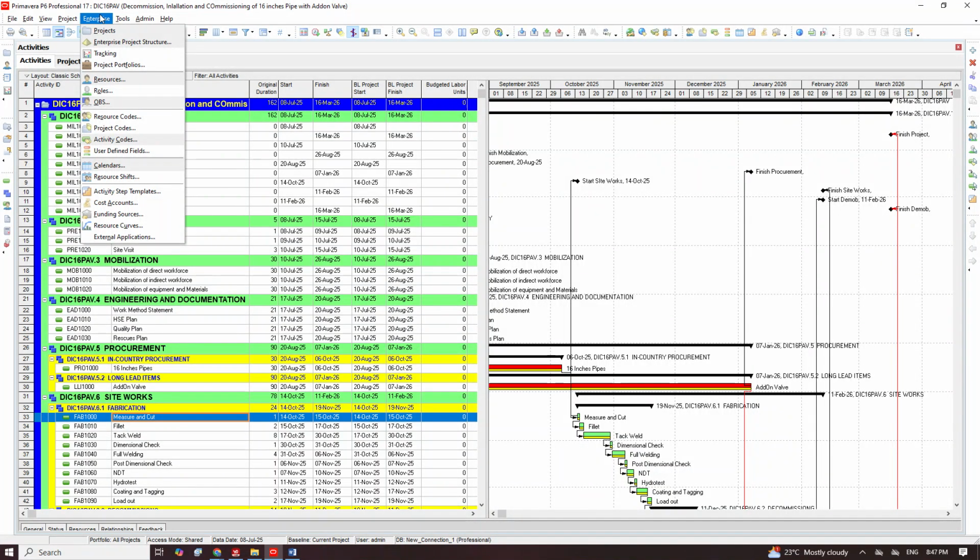The next thing is, since it's a schedule and you are not there, let's assume it's abroad. So the next question is, how do you now know what is happening abroad? Because somebody can be progressing a document and be sending to you, telling you I'm doing it, but he's not doing it. And we now say attach pictures. What they are trying to do is to make sure that what you are reporting is true.